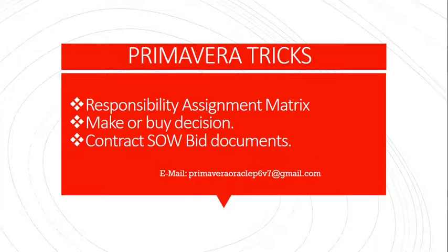After that comes the make or buy decision. This is basically related to contracts, so whatever things you are buying or giving, you have to take note of that. After that, the contract has to be documented, which you have to keep in mind. If there is any change in revision or in the scope, you have to check those against the contract, statement of work, and documents also.